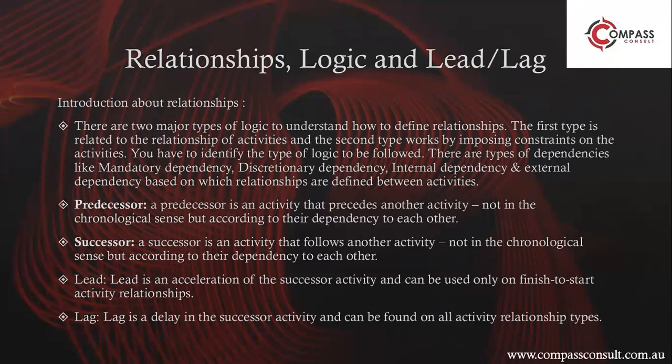And in order to do that, it's better to apply a constraint to these dates. Of course, there would be a relationship that would lead to the finish milestone, but generally to the start milestone, there is no relationship. Like, if you see a project access date, there's no relationship to it, it's the starting point.